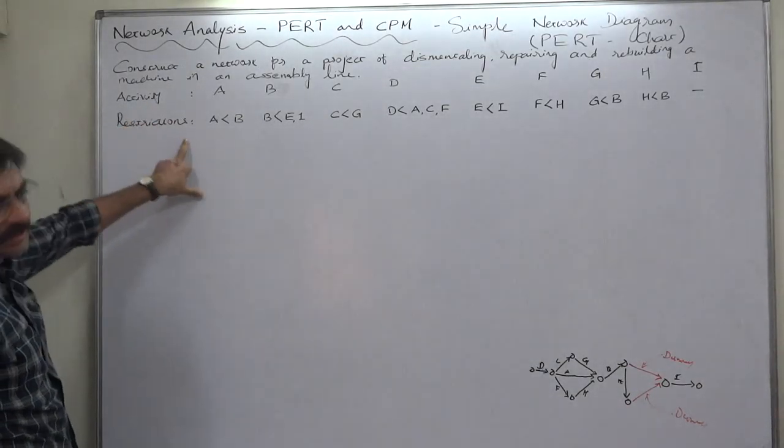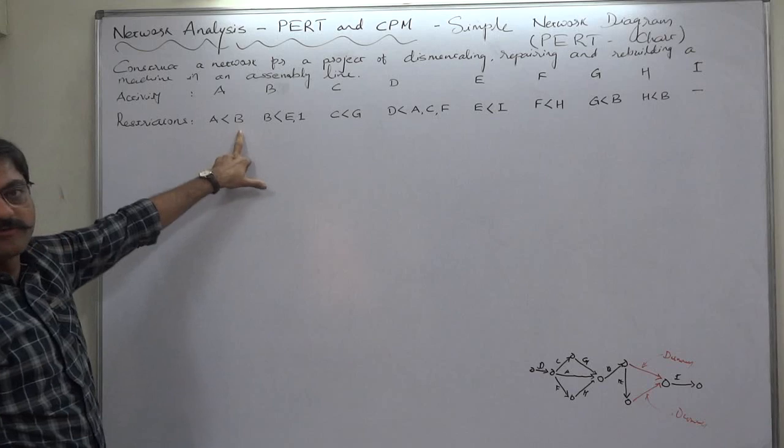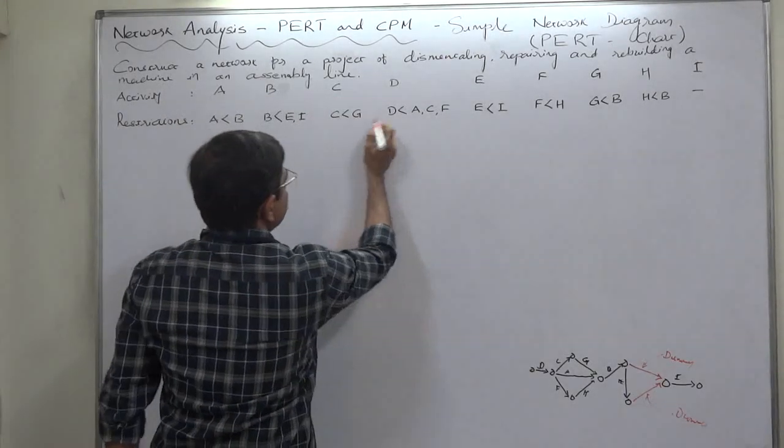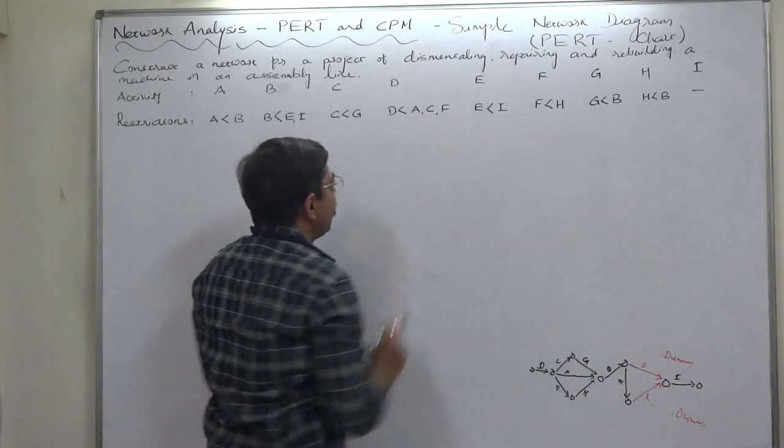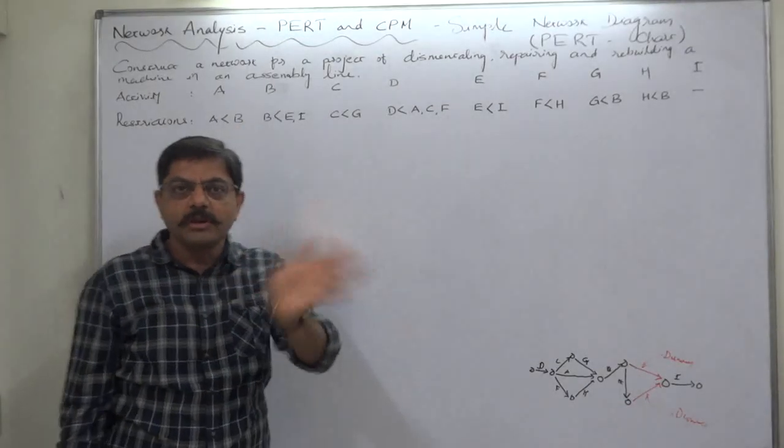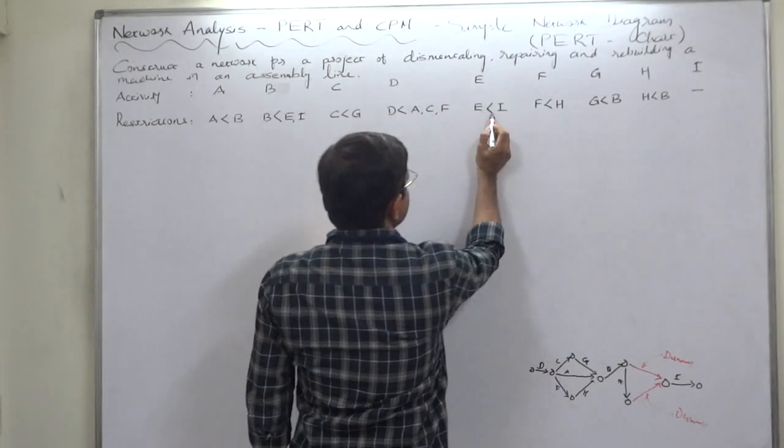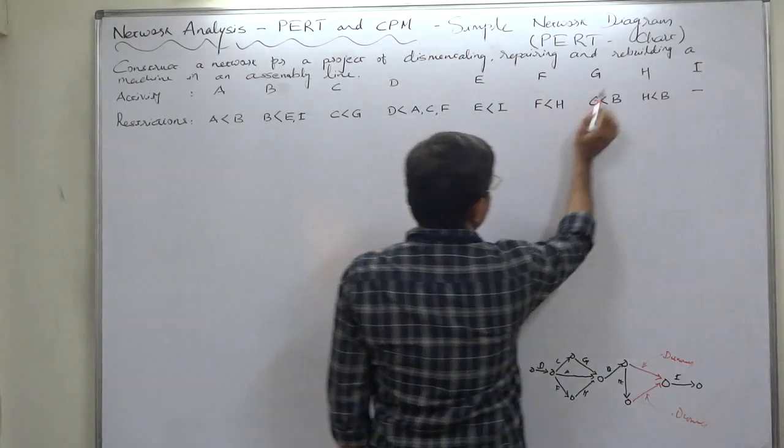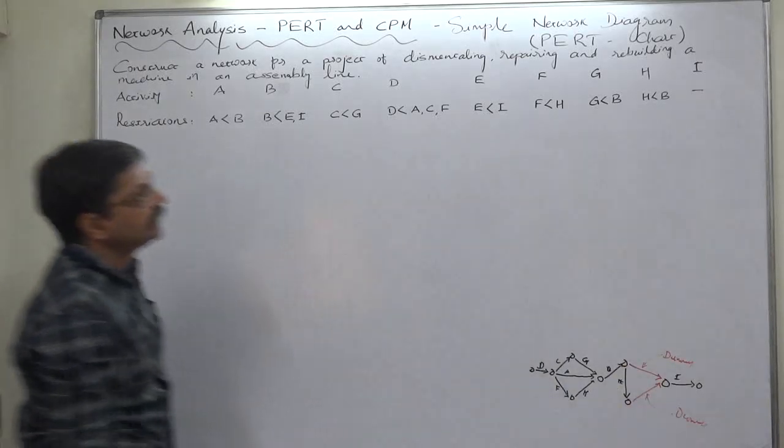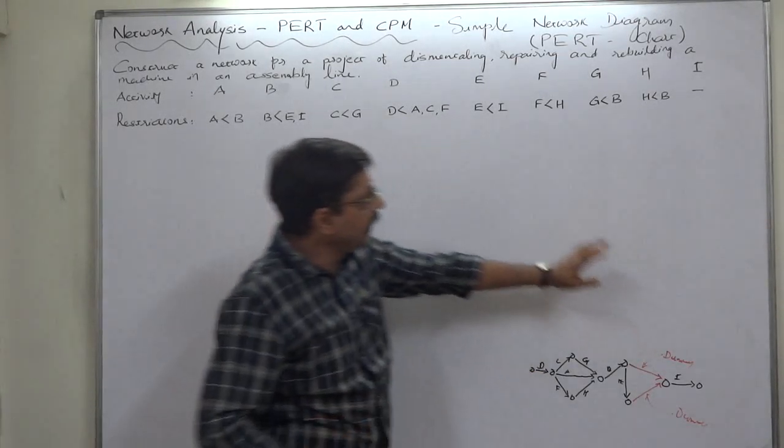Activity and restrictions. Activity A is predecessor of B. B is predecessor of E and I. C is predecessor of G. D is predecessor of A, C, and F. E is predecessor of I. F is predecessor of H. G is predecessor of B. H is predecessor of B. And I doesn't become predecessor of anyone, that means E is the last activity of the project.